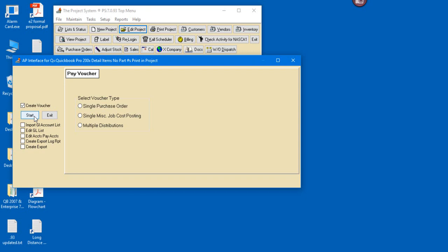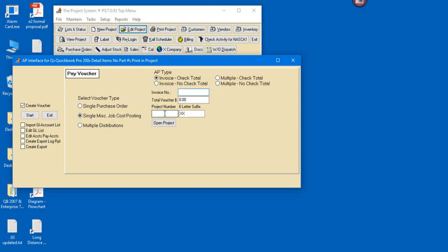Now, the other interesting thing that can happen through the accounts payable interface would be, let's say, an extra invoice for a lift or something that we didn't estimate. We get an invoice from a vendor, so our project is 9716, okay, and our invoice number is like that. It's a $1,200 scissor lift or something like that we forgot to estimate. Oh, bummer. That's going to hit our job as a negative effect to our job because we weren't planning that.